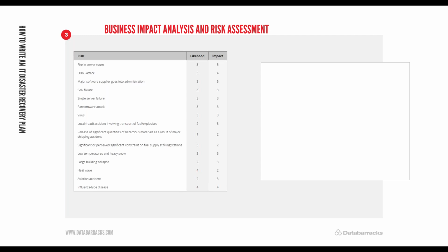We like to score all risks, and there's a variety of opinions as to whether you do a 3x3 or a 5x5 or an even bigger grid. But here we've scored everything between 1 to 5 for probability or likelihood, and the same for impact or severity. Again, choose the language that you prefer. The higher the number, the more serious the type of risk.